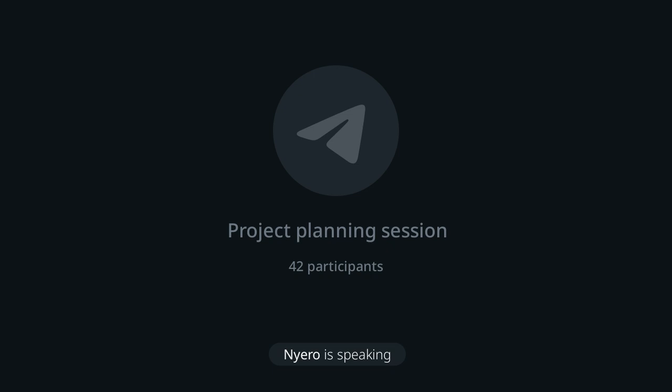Your roadmap, your backlog, is status based, right? If you remember, most of you started with in progress, not started. Now you can do a now, next, later roadmap. Let's say you have 10 features, and I've asked you to prioritize only three using MoSCoW. If you are using the MoSCoW framework, the three in your must category are what you are launching.